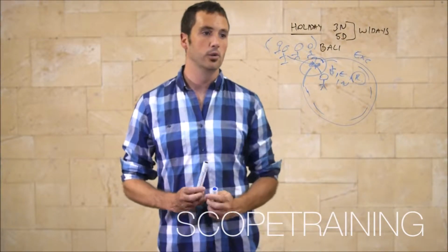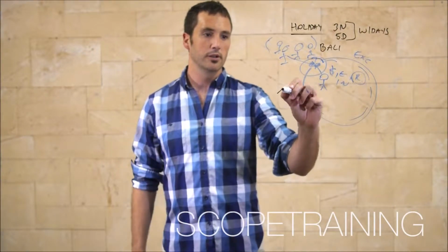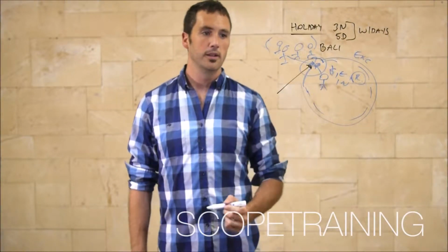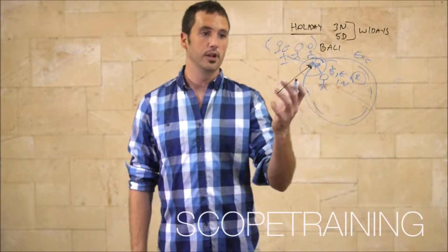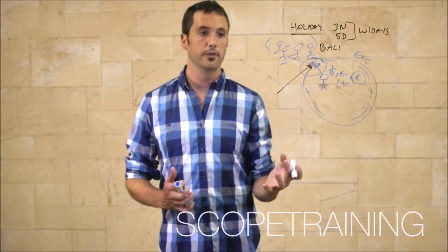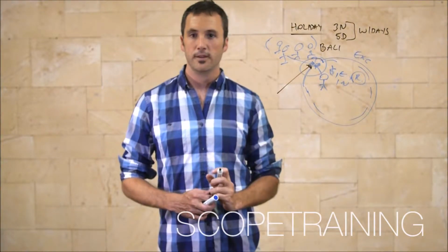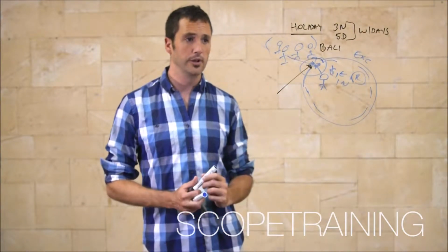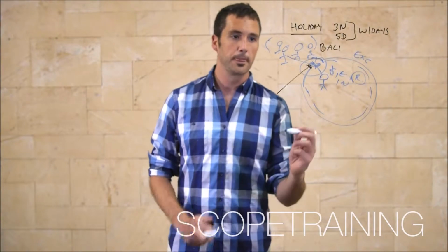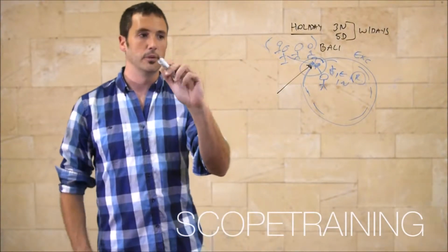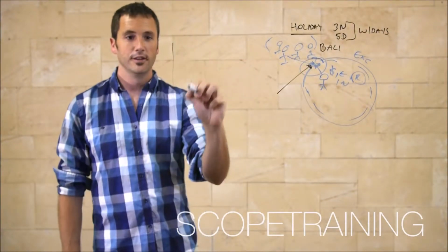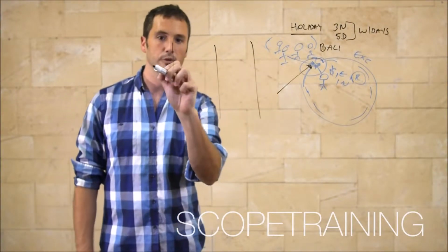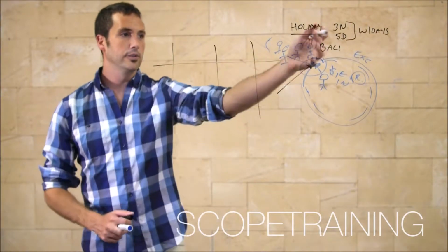And contract law 101, if you write a contract with an ambiguous scope, it tends to favour the party that didn't write the contract. So you tend to lose out. So let's be good kids and let's write a clear scope. Simple and easy way to do this, scope matrix. And all it is, I'm going to use the very fun version here, all it is a filtering mechanism. Let's use the same example here.